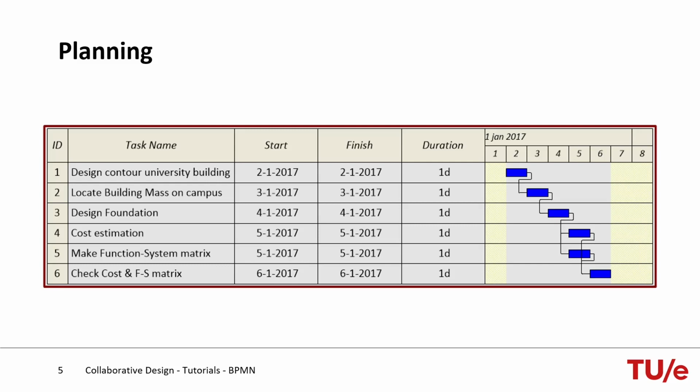To make such a planning, I think for this project it is needed to make a weekly planning for the whole quartile, which is more global. And for every week you will make a daily planning, which you will always make 1 week ahead. Because you don't know exactly how the project will proceed, and therefore you will update this planning week by week.